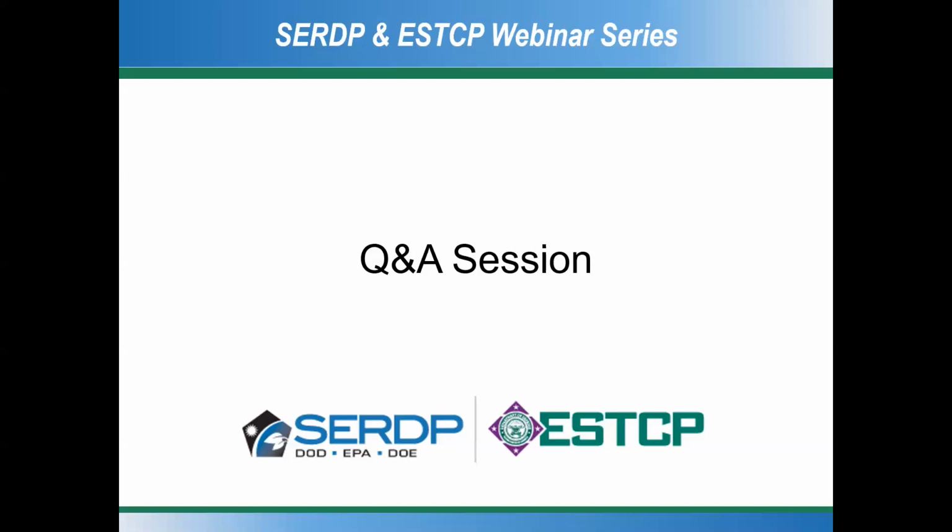Okay. Next, could you talk a little bit about the standards used in the design of the microgrid? You mentioned testing to IEEE 2030.8. Was IEEE standard 2030.7 used in the design? Yeah, so 2030.7 is the microgrid controller requirements, and 2030.8 is the testing standard. So in order to pass 2030.8, you'd have to be generally designed to 2030.7. So that's how we did it.